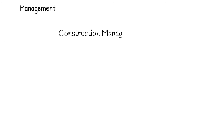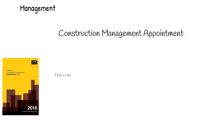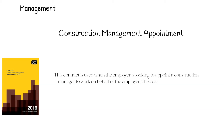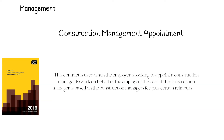Construction Management Appointment: This contract is used when the employer is looking to appoint a construction manager to work on behalf of the employer. The cost to the construction manager is based on the construction manager's fee, plus certain reimbursable costs, such as fuel.